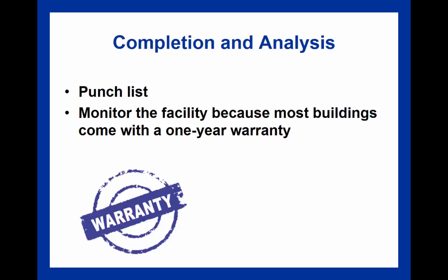There might be some cleaning involved. There might be a need to consult the punch list, and the punch list, like I said, is a record of small matters that need to be addressed before the owner can take ownership of the facility. So those aspects of the punch list need to be completed. And of course, once that punch list has been completed and the owner is satisfied, then the ownership would change,